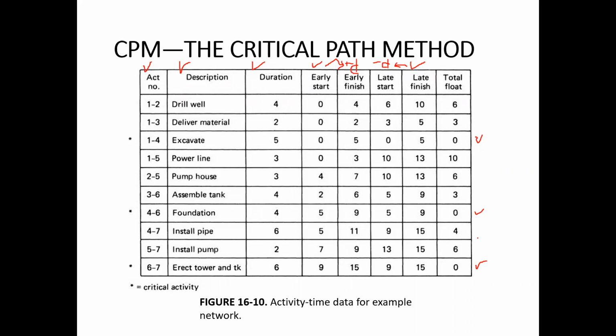So for preliminary planning, the bar graphs are used. But bar graphs can also be used as a result of the calculations from the network methods. So there are several approaches. If only a bar chart is used, then that may or may not be a very accurate method. If the network is used and then, as a result, some bar chart is produced, then that will be very accurate.